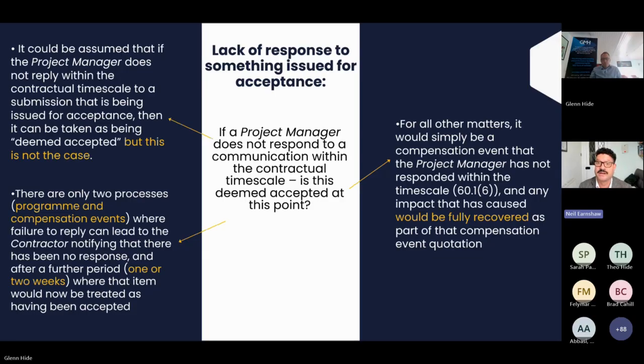But also, I'd always say, handle this one with care as well. Step number one should always be, pick up the phone, send a polite email reminding, just to say, we were supposed to have a response to the program yesterday. How are you getting on with it? Do you need any more information? When can we expect a response?